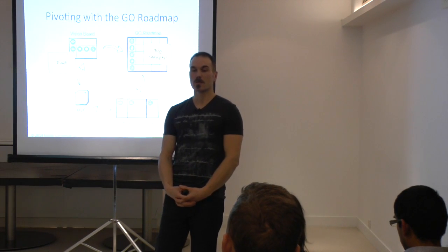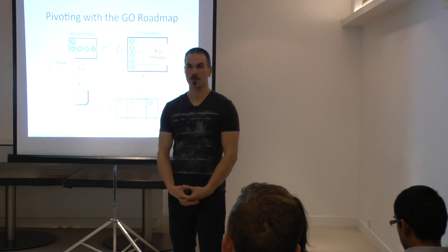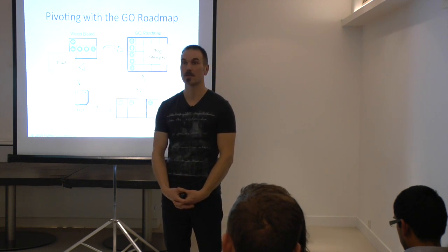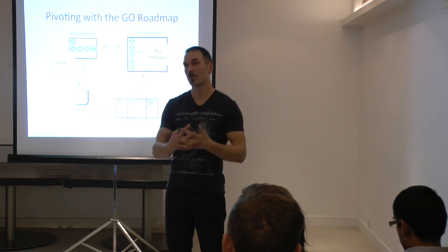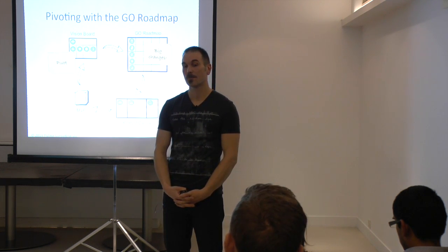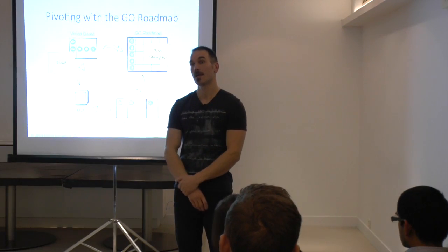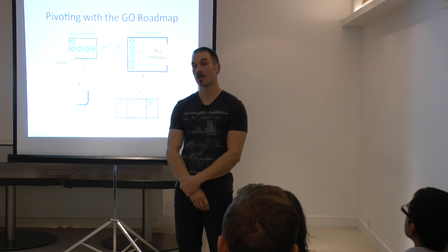But I think you always need to look at whether the release goals on your roadmap still make sense, right? And if they need adjusting and adapting. And that, in my mind, is part of a regular review process. If you haven't met the goal of, say, version 1, then you should consider what the impact is to your roadmap, and what adjustments you have to make. You may want to adjust the subsequent goals.